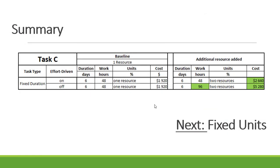In summary for fixed duration: with effort-driven on, work is fixed and duration is fixed — the two resources each work 24 hours at a total cost of $2,640. With effort-driven off, work can change — each resource works 48 hours for a total of 96 hours, and cost increases to $5,280.